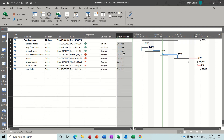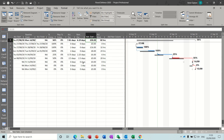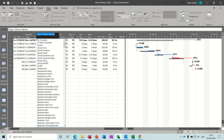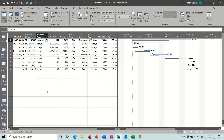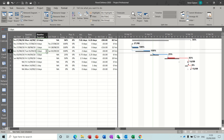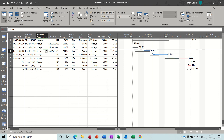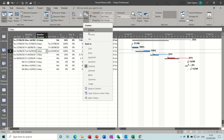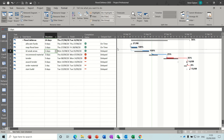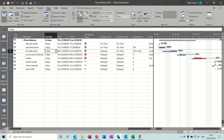Those three were on time, these are delayed. Now the reason that one is on time is because I actually changed the duration to two days actual. If I switch to the tracking table and insert the baseline duration column — the baseline duration was three days but it actually only took two days. So initially it would have finished a day late, but because the actual duration was reduced by one day it finished on time, and that's why you need that if statement to pick that up.